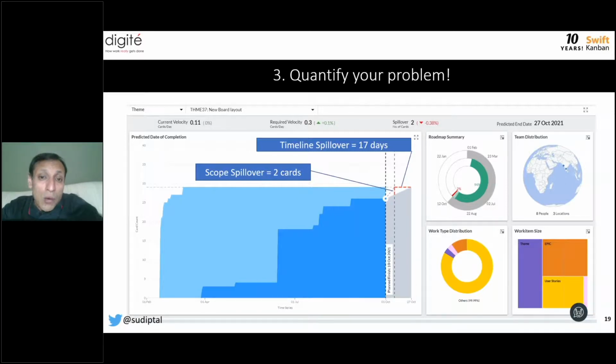So you now understand that you are going at a certain velocity. I can increase my velocity, and a common approach that people unfortunately take to improve velocity is to throw more people at the problem. They hope they'll be able to churn out more, even if teams understand that they will not get proportionate value.